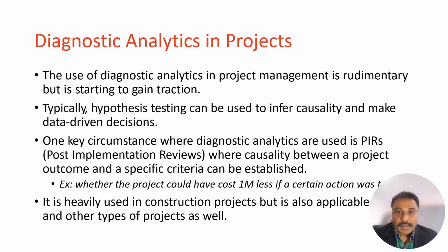In project management, diagnostic analytics is increasingly being used to support decision making. Historically, project decisions were often based on intuition or retrospective discussion. But with analytics, we can bring statistical evidence into those conversations. A great example is post-implementation review, or your PIR, in projects. These reviews often ask, did a particular action or lack of action cause a cost overrun or schedule delay? For example, could the project have saved a million dollars if a certain decision had been made earlier?